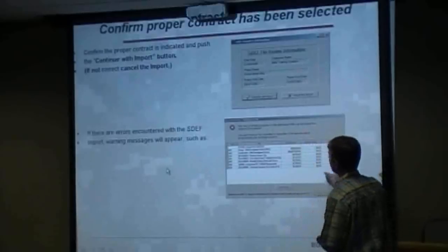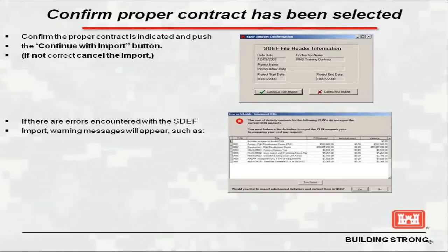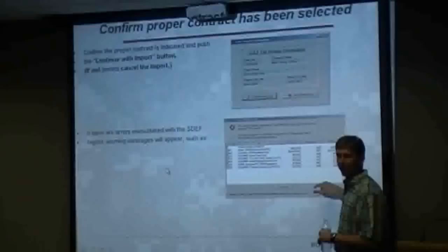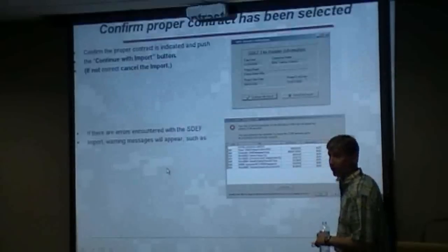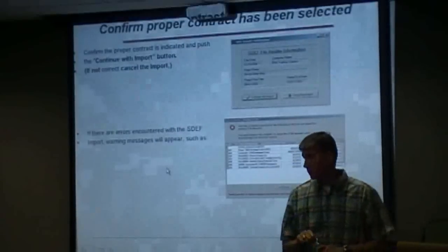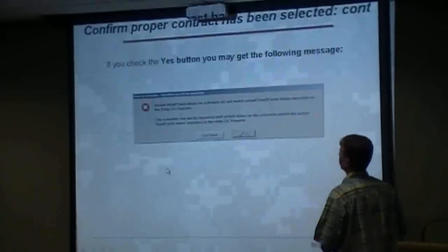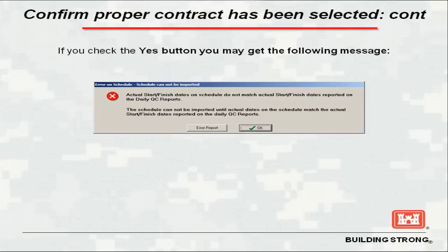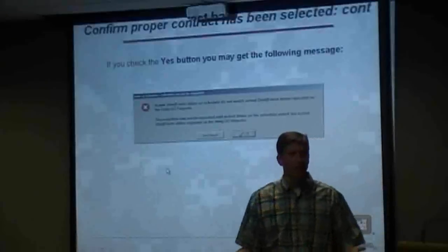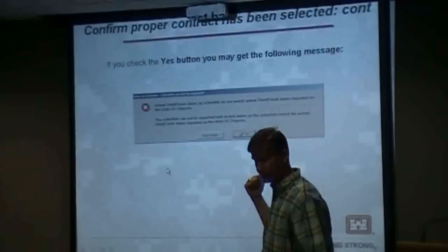This is a new feature right here — it says the activities don't match the clean values, and here's where your problems are. It will not import that SDEF until you fix this in Primavera and send a properly balanced schedule. This is part of the checks and balances — it's got to be accurate and right. Here's another error: the actual start dates don't match the start and finish dates reported on the daily reports. You solve that by printing that report and giving it to the scheduler before he does his payout.